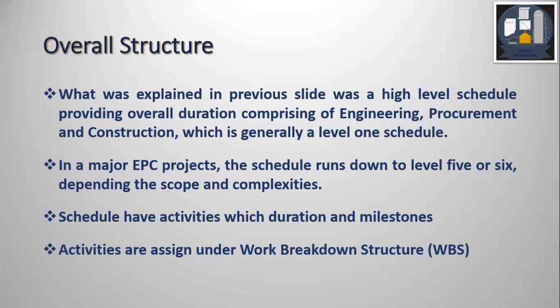What was explained in the previous slide was a High Level Schedule. We can call it Level 1, which showed Engineering, Procurement and Construction over a period of time. In any major project, the schedule runs down to Level 5 or 6, and it depends on lots of things — the scope, the complexities, etc.